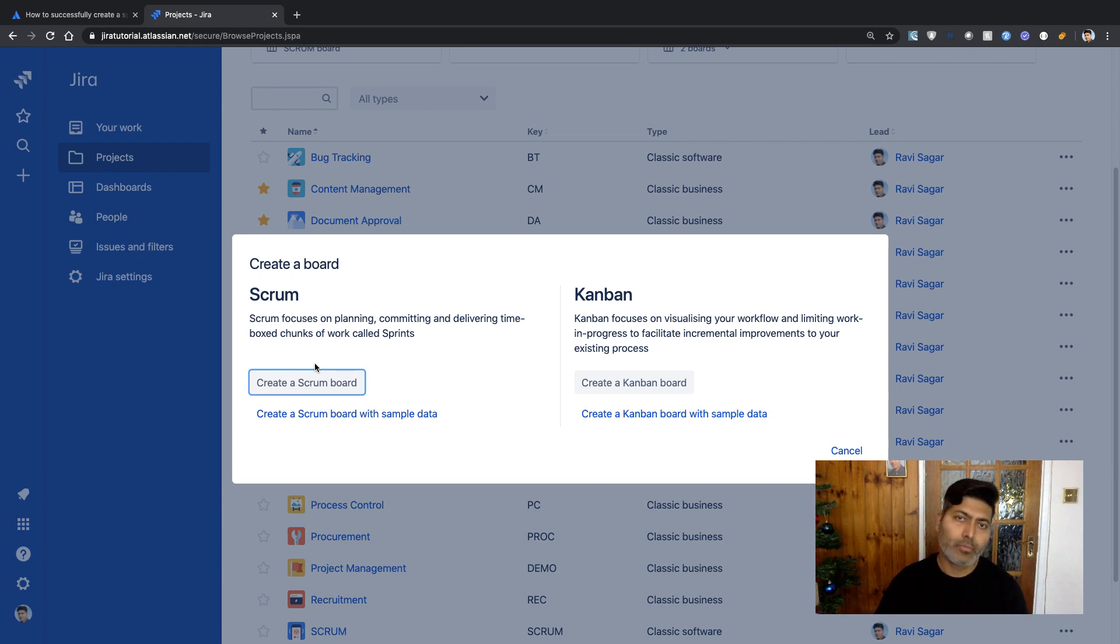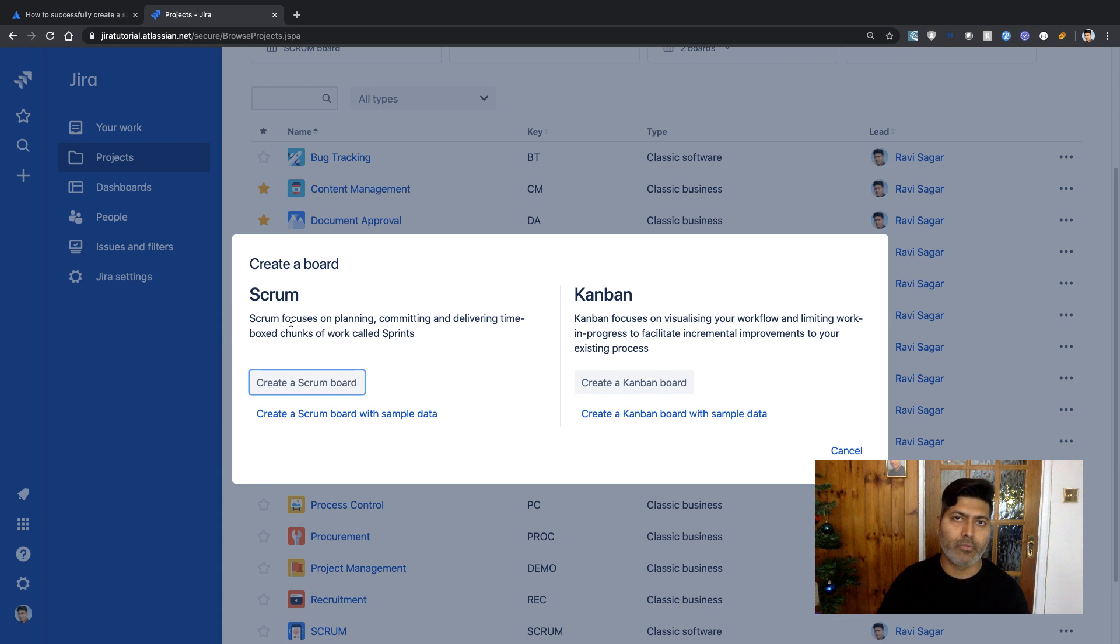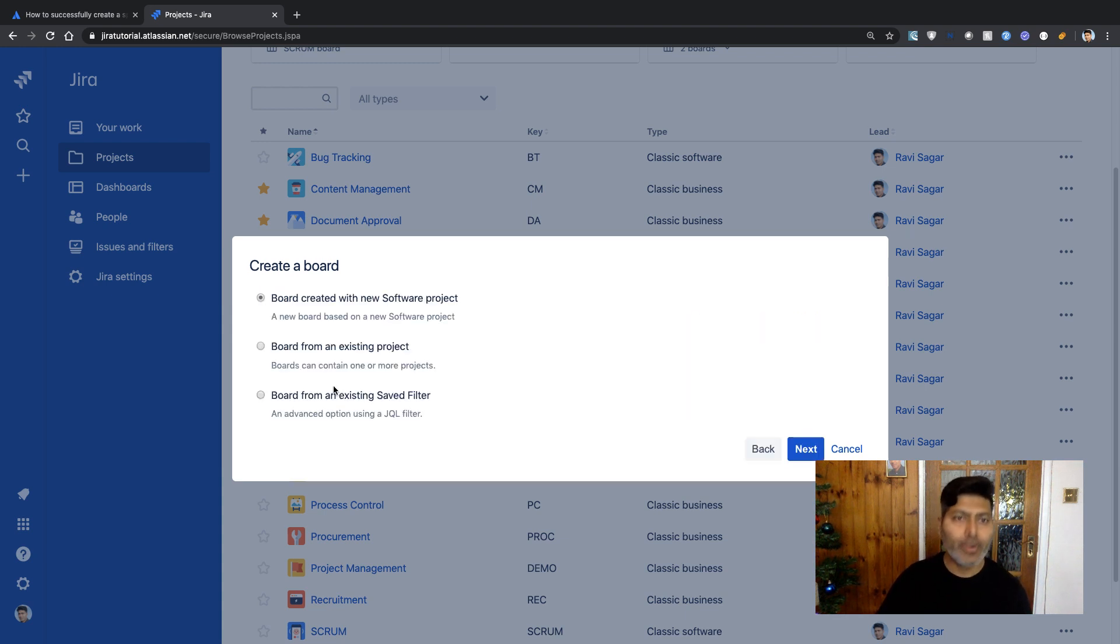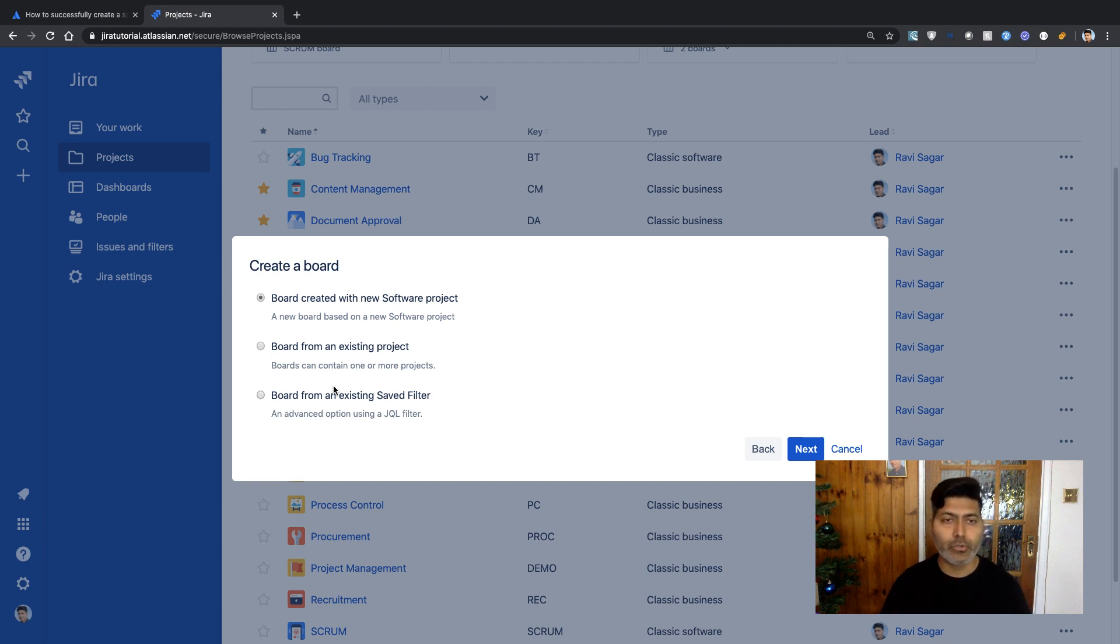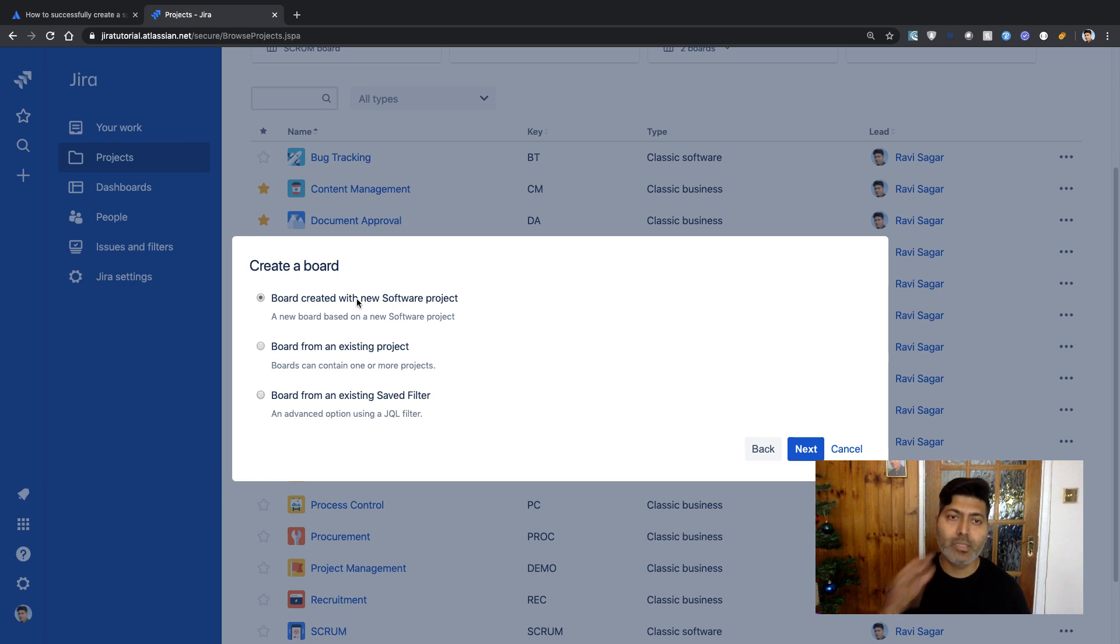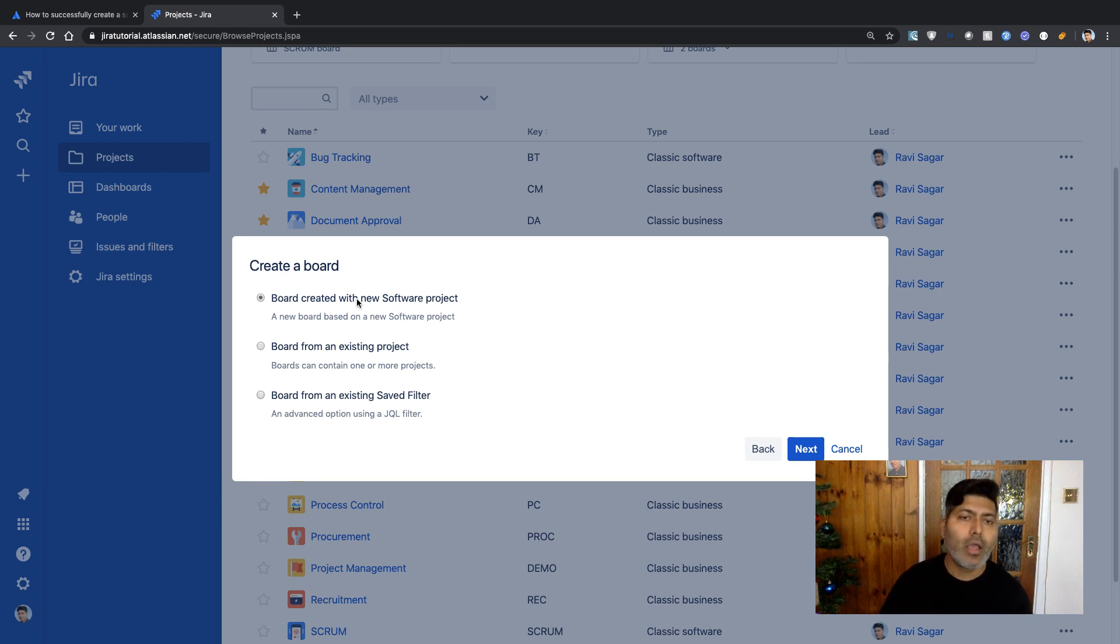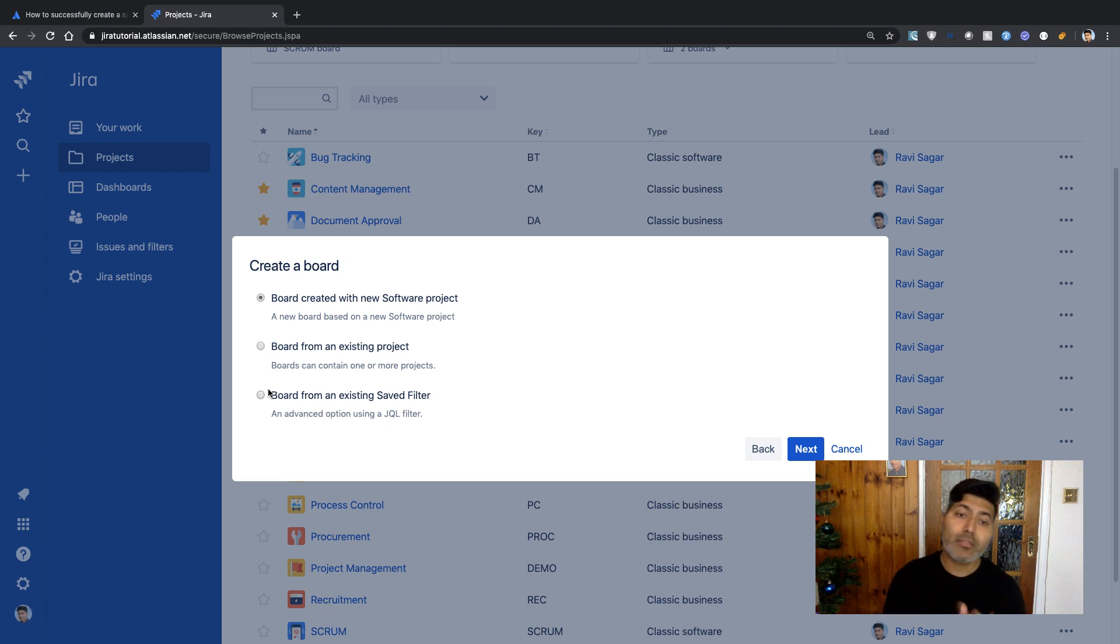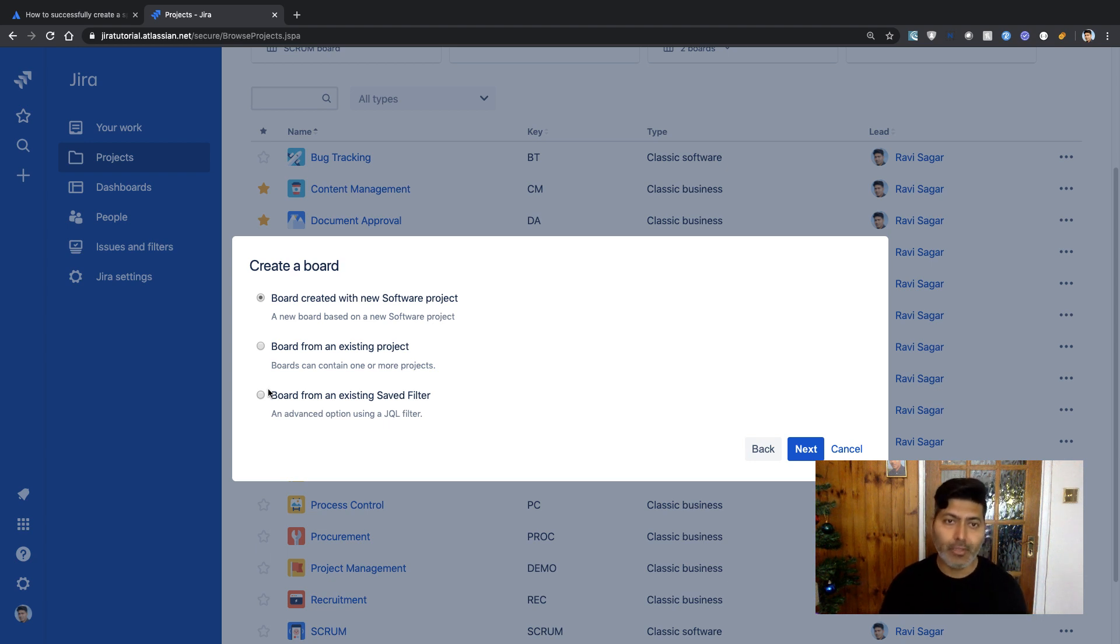You have the option to create either Scrum or Kanban. Since we want to manage sprints, we'll focus on Scrum. When you click on Scrum board, you can create a board with a new software project, create a board from an existing project, or create a board from an existing saved filter. You have all the options.